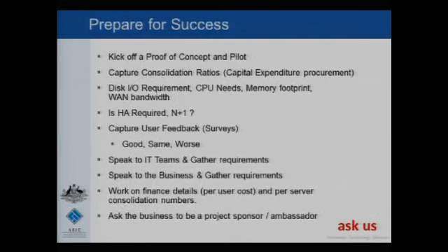So prepare for success. These are the sort of design points that you need to consider. Make sure you do a proof of concept and a pilot. A lot of people don't like that you've got to do these stages, but we really took the lessons learned out of that environment. We made sure users on the proof of concept stayed on it. We removed the asset and kept them working there. We wanted to gather feedback on how this was going and how it was performing. In the background, we were doing a lot of statistics and analysis on how many users we'd be getting per blade or per server, how many IOs were being written and read, all that kind of stuff, so we could work out how much it was going to actually cost us to deliver these solutions.